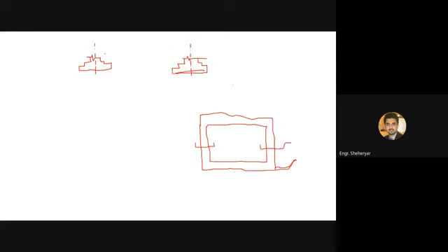The point I wanted to tell you here is that, in the case of symmetrical footing or symmetrical cross sections, when you are finding the distance of the center lines between one wall and the other wall, which is also called center to center distance, the center to center distance for this level will be the same for this level, and the center to center distance will be the same for this level and this level.